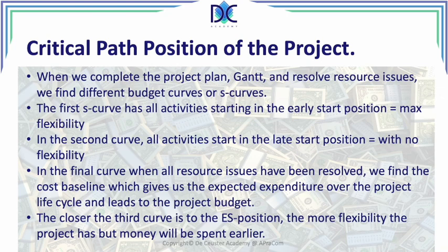We have more slack available than when it's closer to the late start position. The late start position, there we have no slack. So when the budget curve, the project baseline, cost baseline, is closer to the late start position, we see that we have less flexibility.